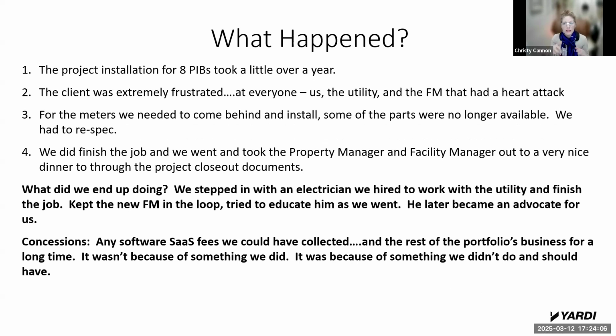We did still need to come back and install some sub-meters, because utilities won't necessarily install a PIB on all of their utility meters, because not all of them are PIB ready or PIB compatible. So we did have to come and install some sub-meters, but it had been so long, not all the parts we had originally spec'd were still available. So we had to respec the job.